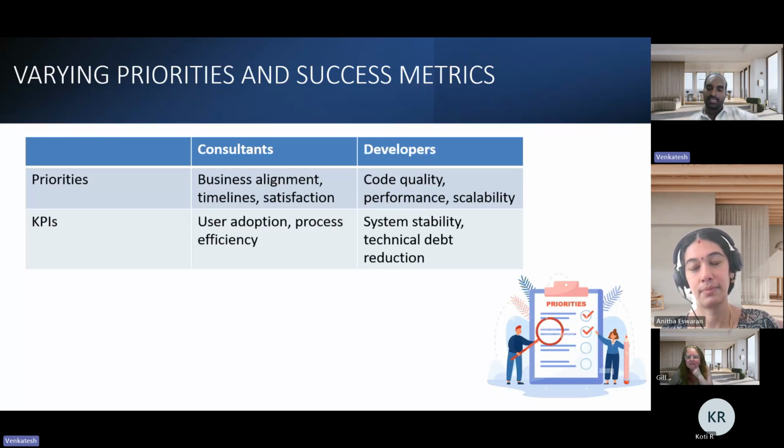To that end, test it on a dev machine and make sure that is properly communicated to technical. Once the bug fixes are done and all the scenarios in the FDD are tested, only then move to the next UAT stage. This is a standard recommendation and best practice followed across all projects. You have to make sure that process is being followed.